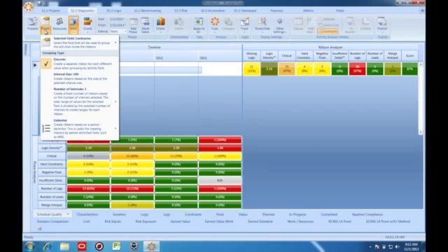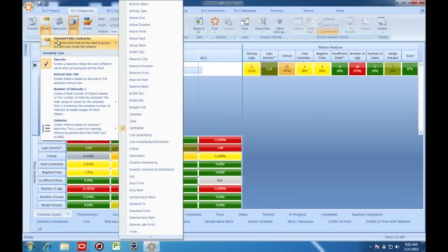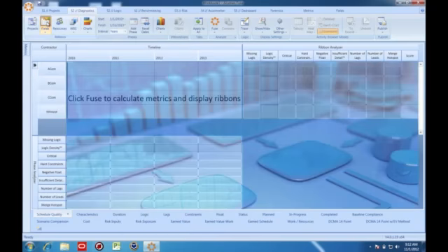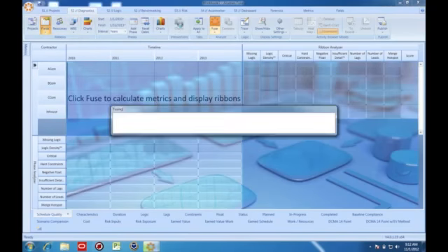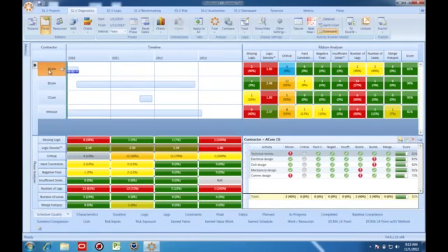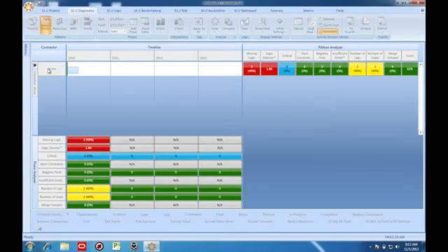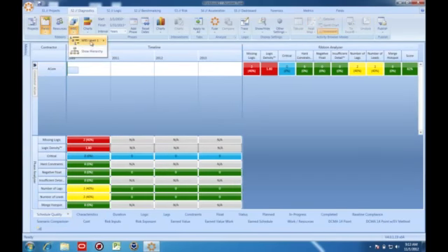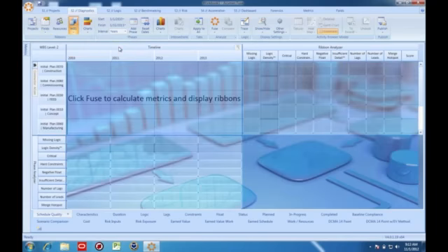Now let's go back to the diagnostics view because I want to show you one more thing. We're going to slice and dice our project a bit, and we're going to use scoring to gain some additional insight on where we have opportunities for improvement. In the diagnostics view, I'm grouping the project by a field called contractor. The schedule quality metrics are now applied to each activity grouping, which is contractor, and the score for each group is calculated individually. We can see that ACOM and in-house areas of the schedule need work regarding this missing logic metric. We can go a step further, and I'm going to focus just on ACOM, and I'm going to group that contractor by WBS.